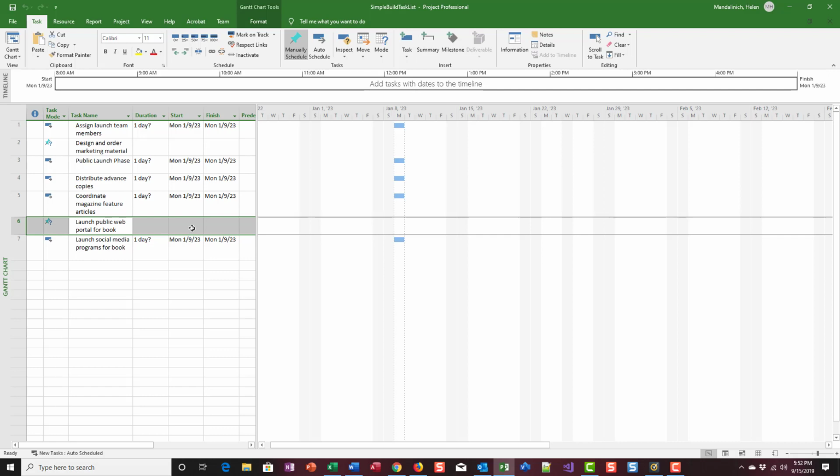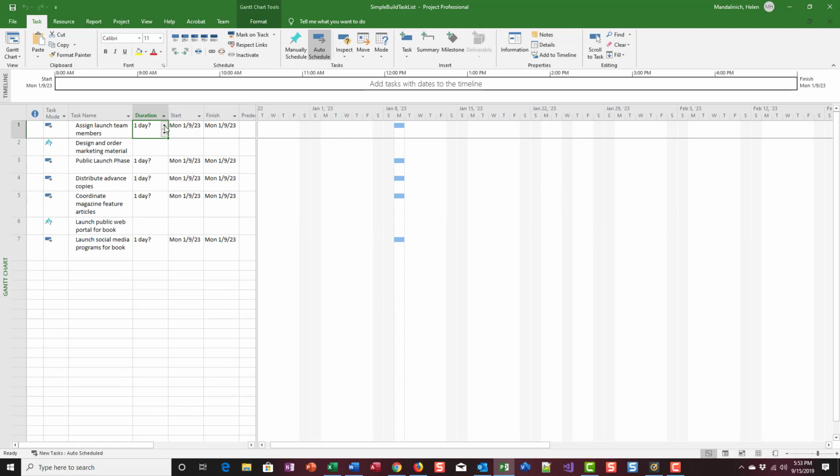1. Enter a duration of 1 day for task 1. Assign. Okay, so we're going to make it 1 day. We're going to take that question mark away. To assign, enter the following. So there's a little table. So task 2, duration, we're going to say check with marketing team.